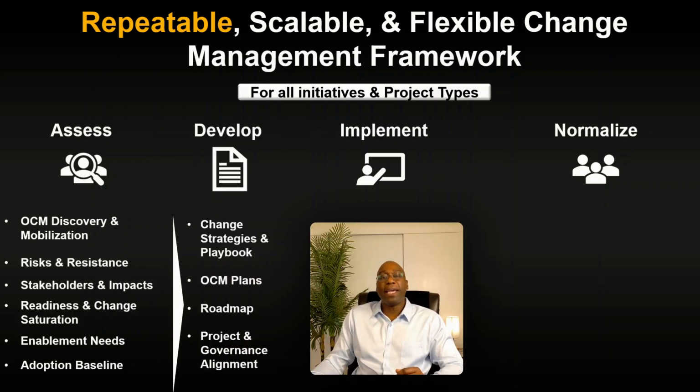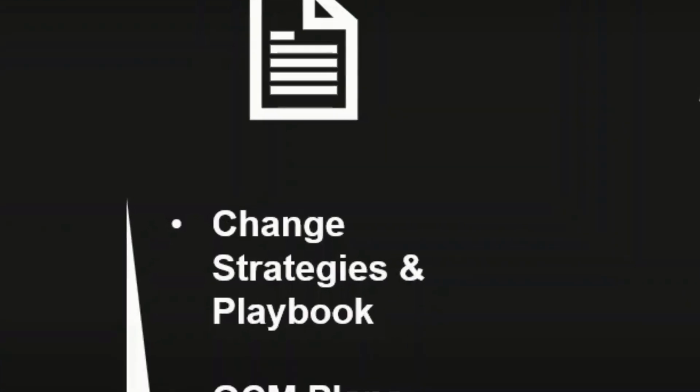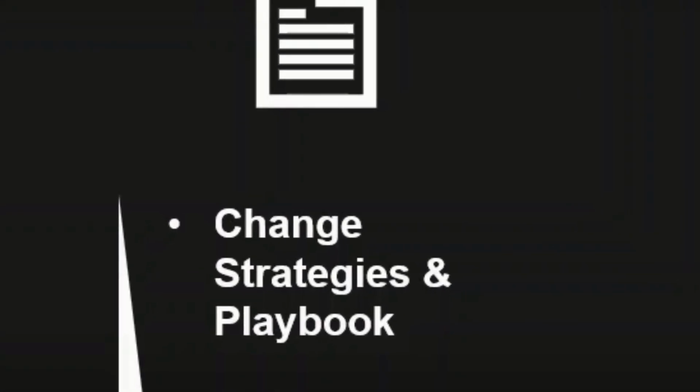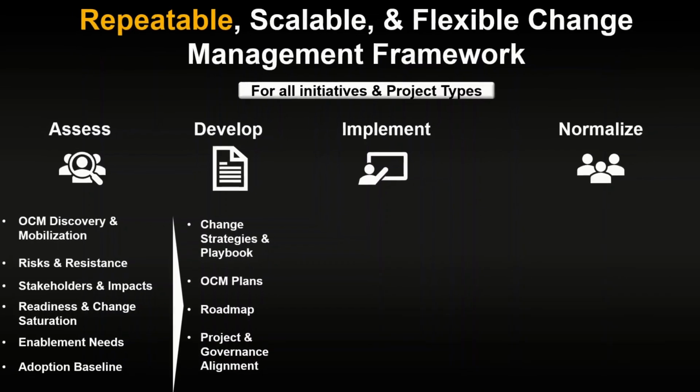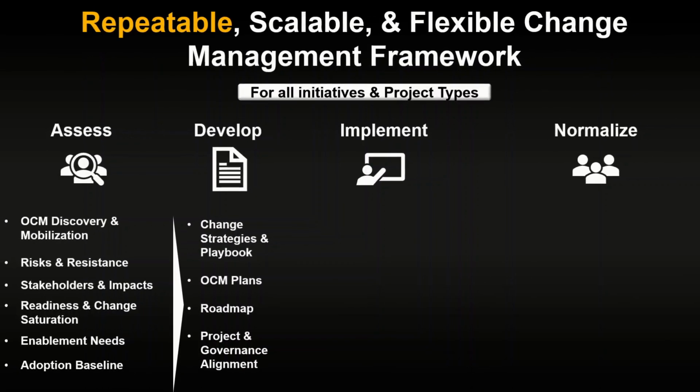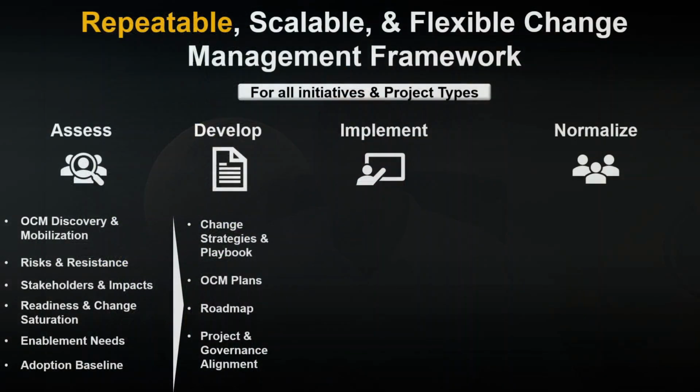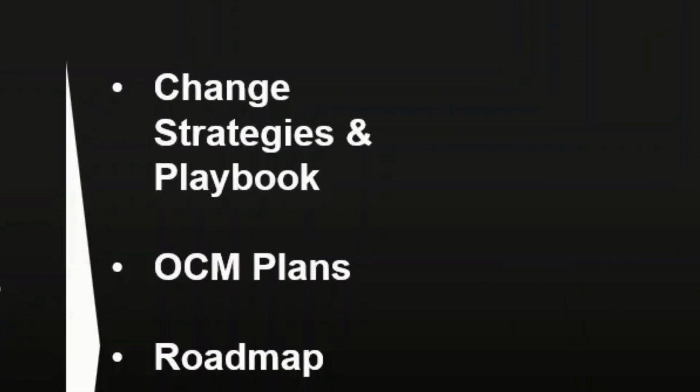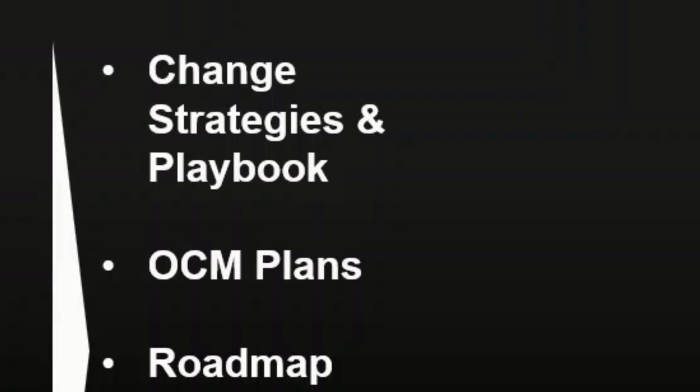For the develop phase, you or the change management resource will want to develop the change management strategies and playbook, which basically defines the overall holistic change management approach and guiding practices. You or the change resource will also want to develop the detailed step-by-step plans for rolling out communications, training, engagement, and other change management deliverables.